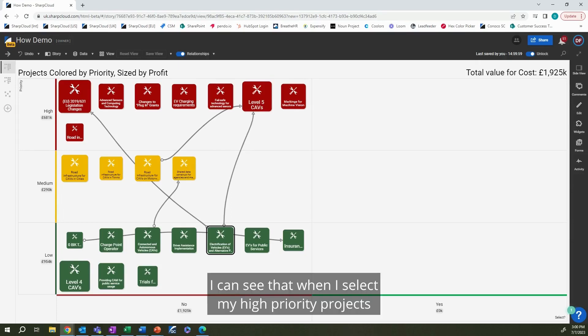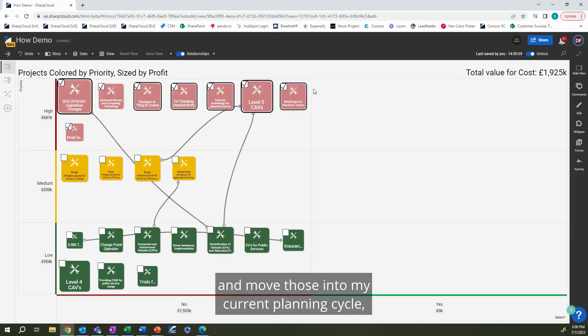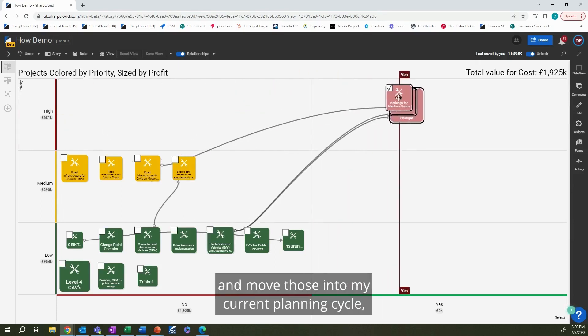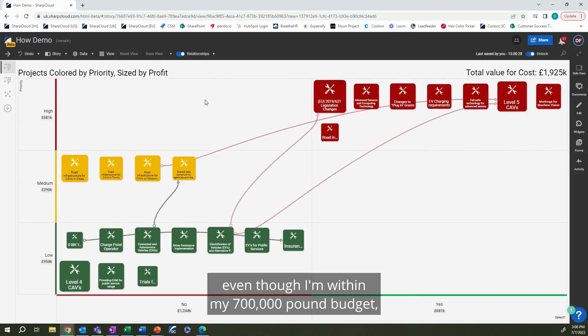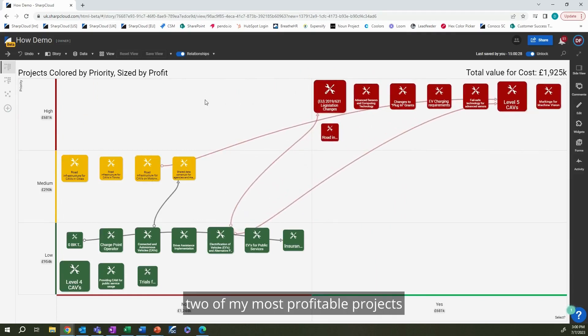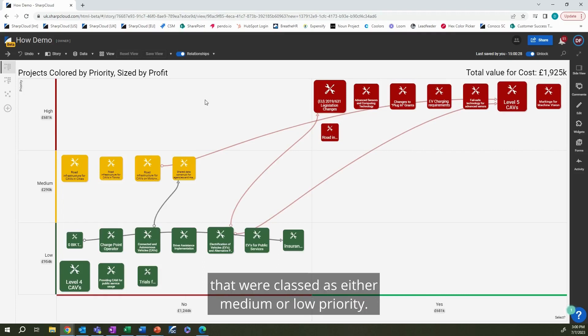I can see that when I select my high-priority projects and move those into my current planning cycle, even though I'm within my £700,000 budget, two of my most profitable projects have dependencies on projects that were classed as either medium or low-priority, so I need to include those in my planning cycle, too.